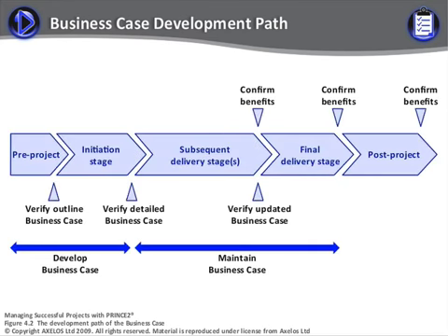After the end of the project, corporate and program management take responsibility for implementation. It is assumed that at an appropriate time, they will have one or more post-project reviews to see whether the benefits actually did turn up and whether the project outputs perform as expected now that they are in operational use. As part of our project close process, we will leave them with some instructions in the benefits review plan about what needs to be done, measured, counted to be able to prove whether or not the benefits actually happened, and we will give them advice about when, in time, it is appropriate for these reviews to take place.